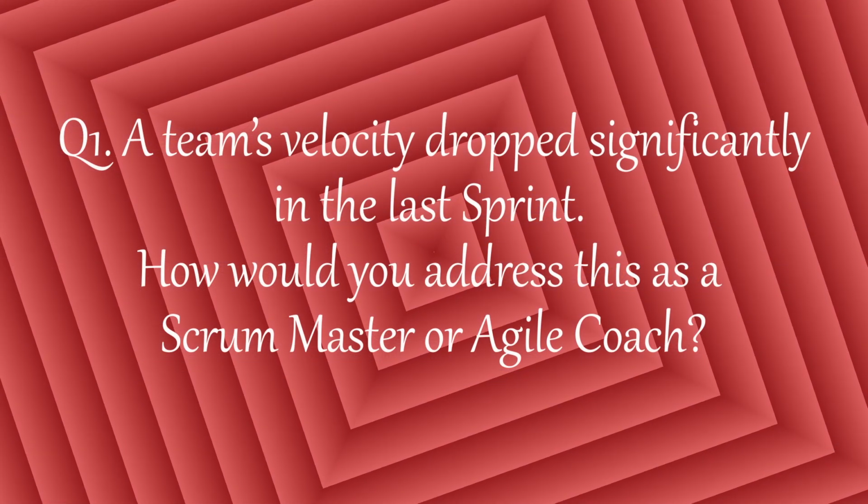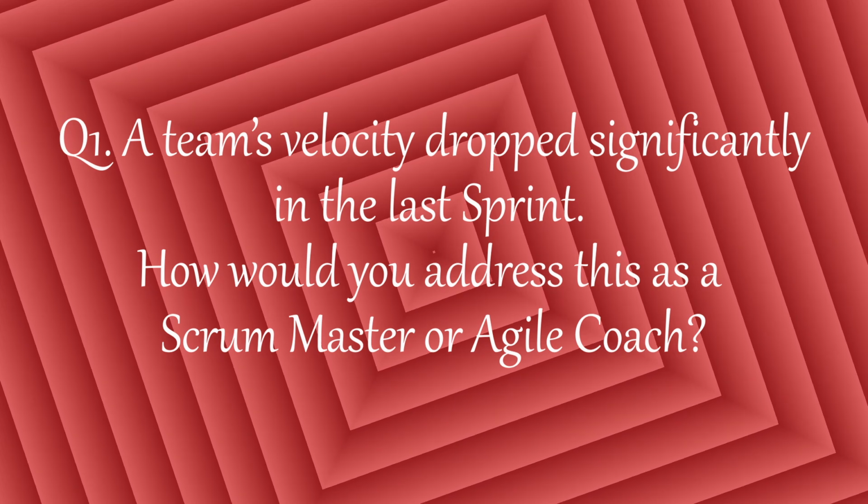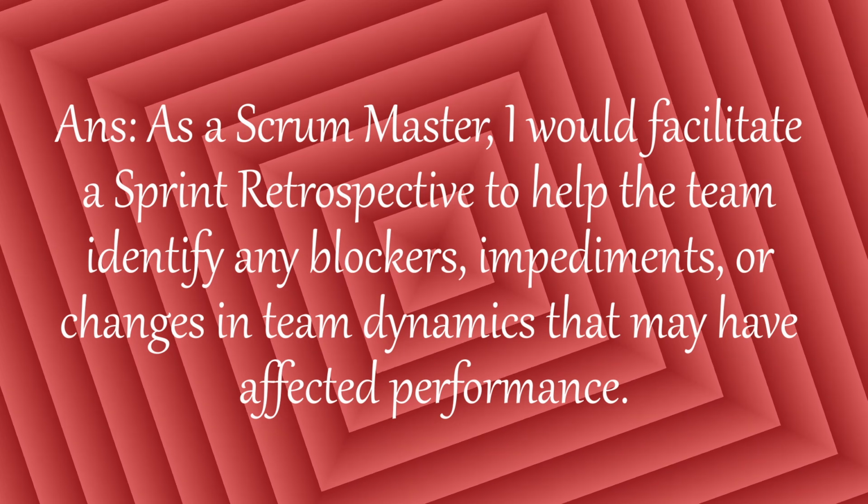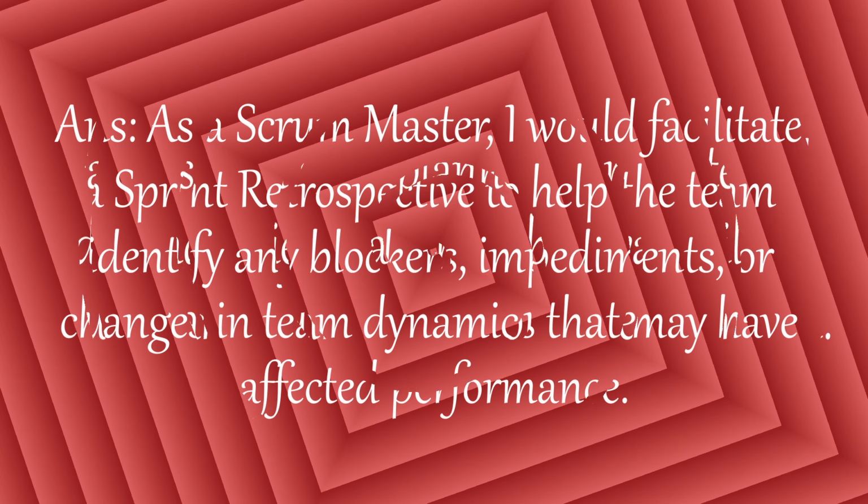Q1. A team's velocity dropped significantly in the last sprint. How would you address this as a Scrum Master or Agile coach? Answer. As a Scrum Master, I would facilitate a sprint retrospective to help the team identify any blockers, impediments, or changes in team dynamics that may have affected performance.